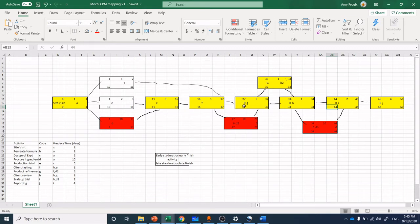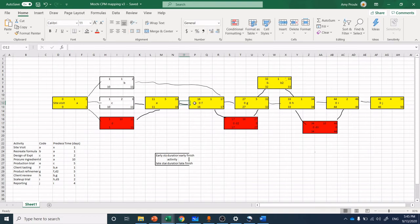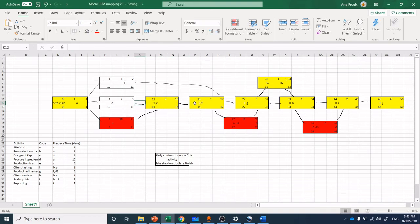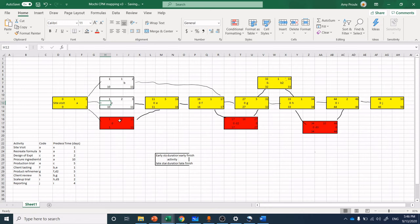32 minus 5 is 27. And 27, we're moving the late finish here, because we have to think backwards in our dependency as well. 27 minus 10 is 17. 17 minus 1 is 16. Note, we do not have a lot of slack in this project at all. And so we have to run absolutely meticulously on the nose when it comes to time. Now, the only places we do have some slack here are up in the recreation of the original formula and in the design of experiments. But if you think about it, the procurement of these ingredients is actually somewhat dependent on the design of experiments. And you could, in theory, say it's actually linear to that.